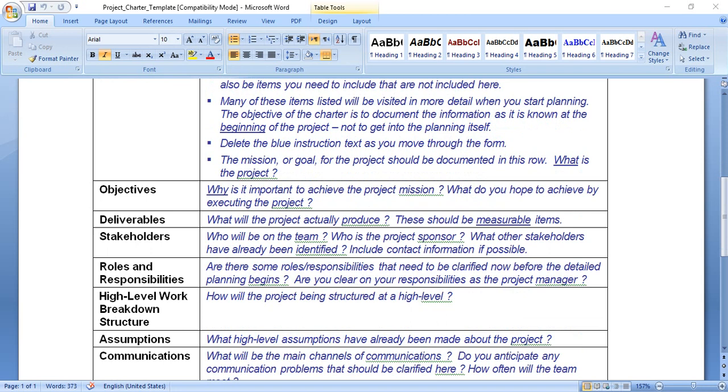We have to take care of some points in deliverables. Number one, a clear statement of what this project will not include. For example, phase number one of the business continuation plan project will include an analysis of how best to back up and secure all data on the servers, but will not include consideration of data held on user systems such as laptops.